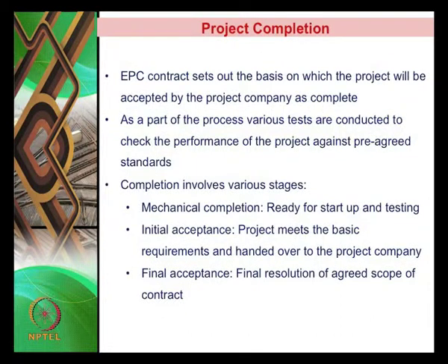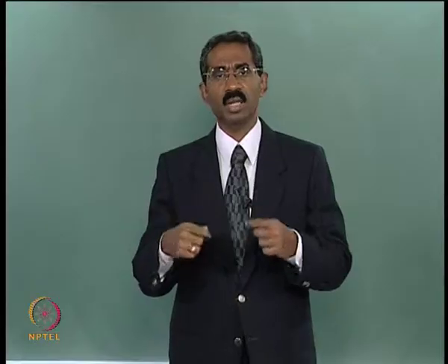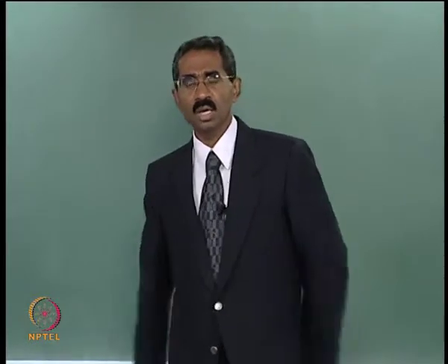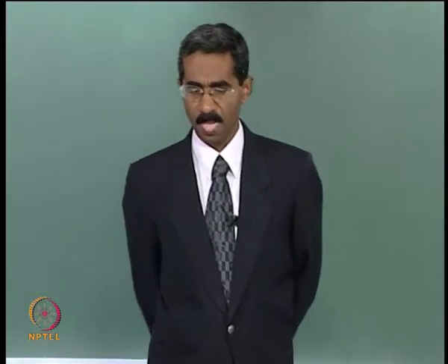The first step is, as a part of determining whether the project is complete or not, various tests are conducted to check the performance of the project against the pre-agreed standards. Is the plant performing as per what we have agreed upon? That is something that has to be tested before we can actually determine whether the plant is complete or not.